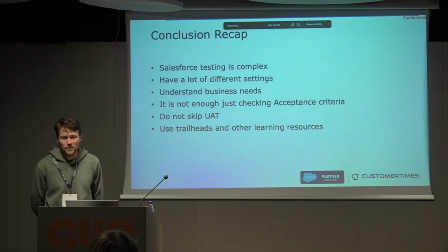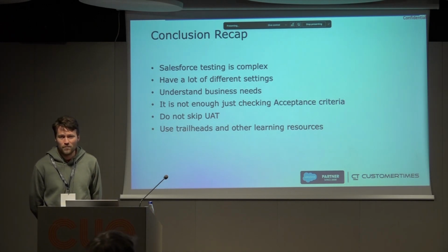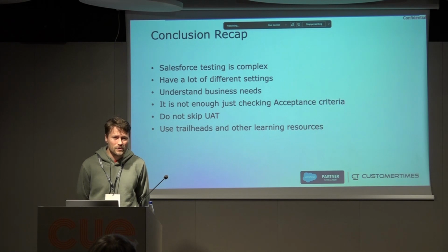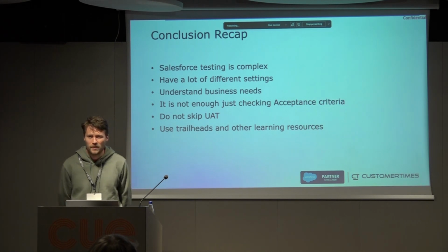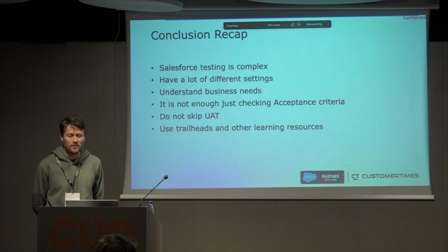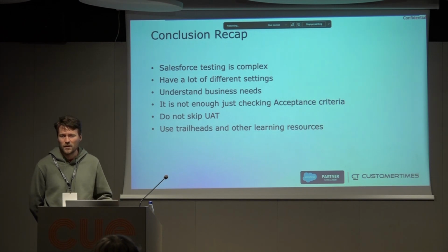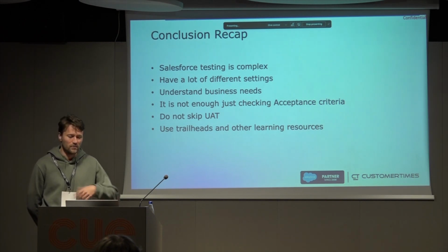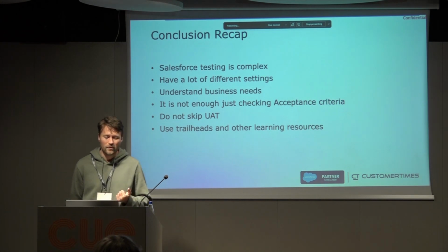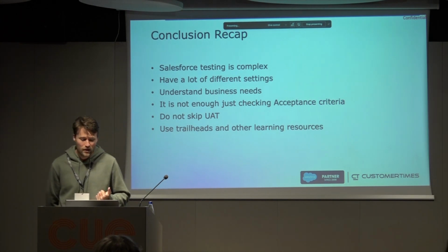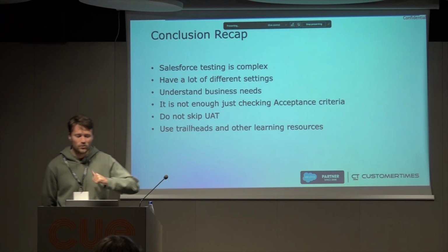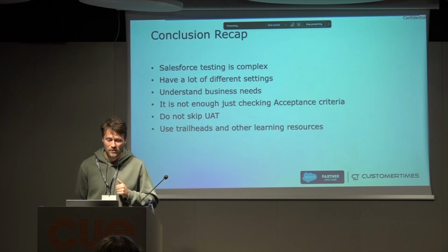And skipping the UAT, or postponing it, could cause big problems for your deliverables, because the client could start to worry about whether we are on track, and you have to dive into a lot of conversation about that. Are we on track? Are we good? What problems caused the delay of the UAT session, and so on. And of course, don't forget learning: use Trailhead, use Salesforce certification, and so on.